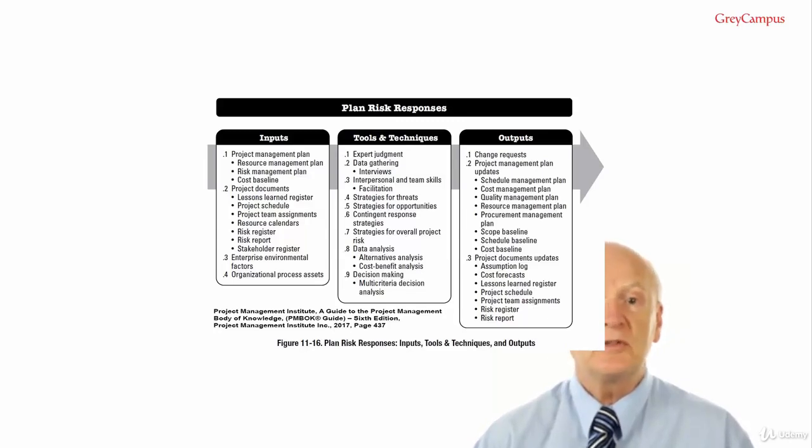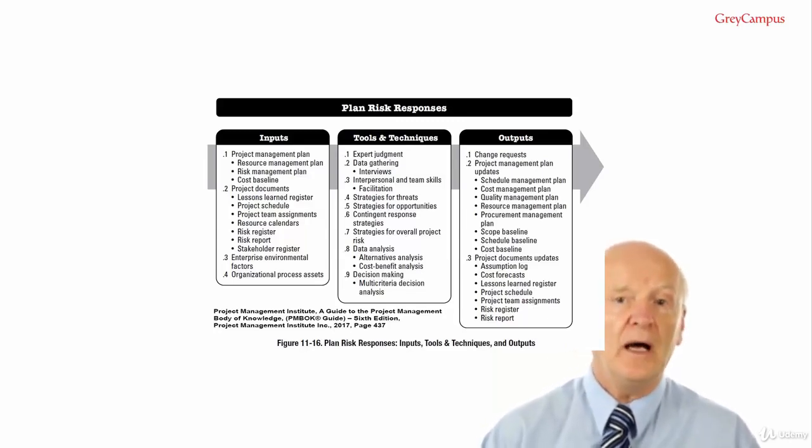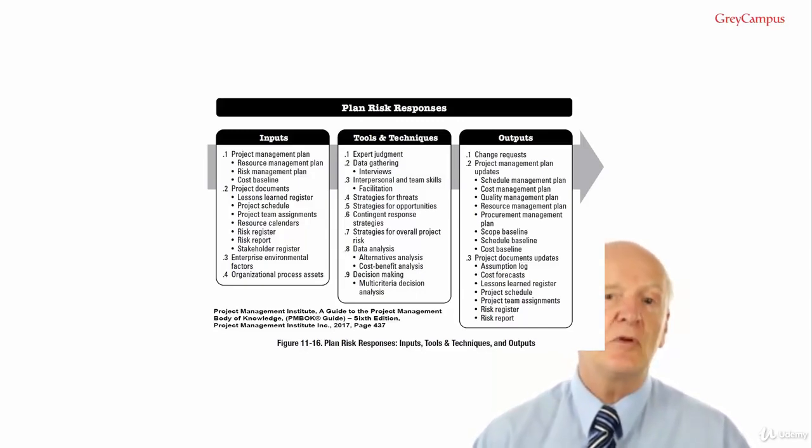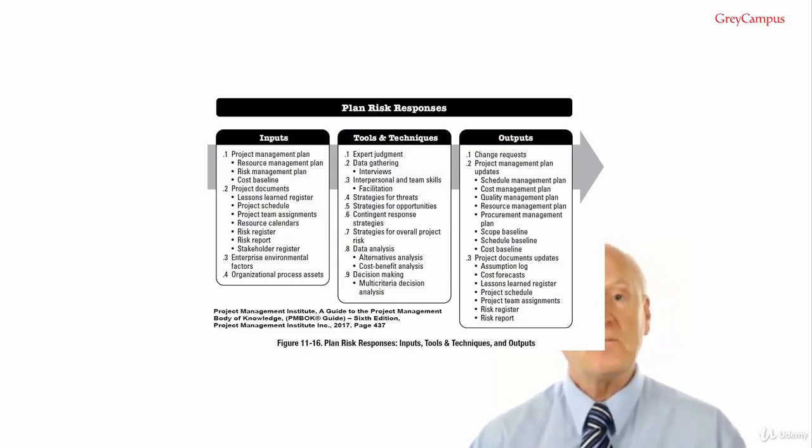Where it is not possible to increase the probability, an enhancement response might increase the impact by targeting factors that drive the size of the potential benefit. Examples of enhancing opportunities include adding more resources to an activity in order to finish early.